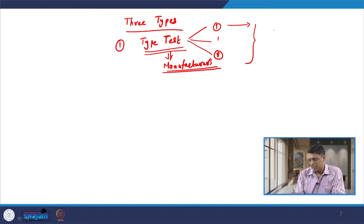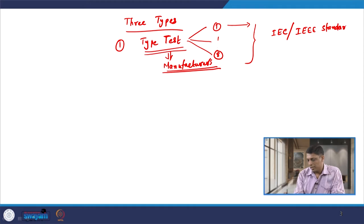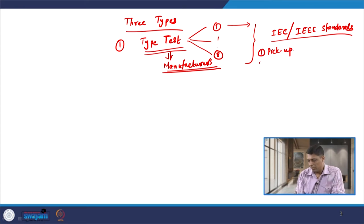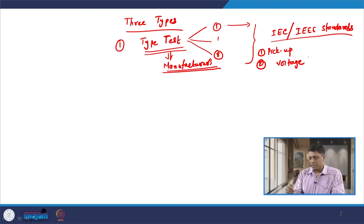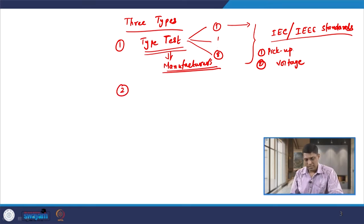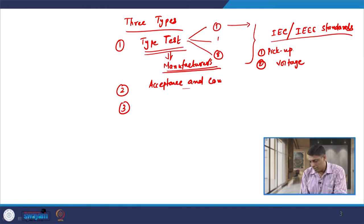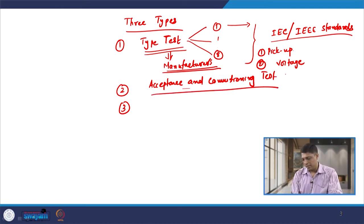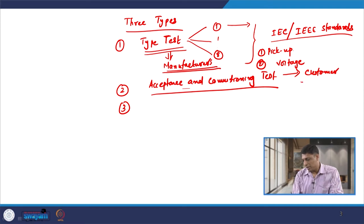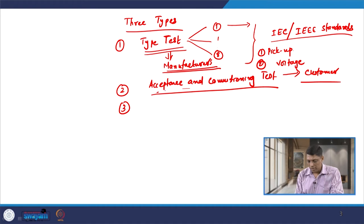These tests are based on certain IEC or IEEE standards. If some limits are given of current or voltage pickup variation, or maybe the voltage variation, all this is performed based on these standards. The second type of test is known as the acceptance and commissioning test, which is performed at the customer premises — whenever the protective device or relay is installed at the customer premises, this test is to be performed before installing.